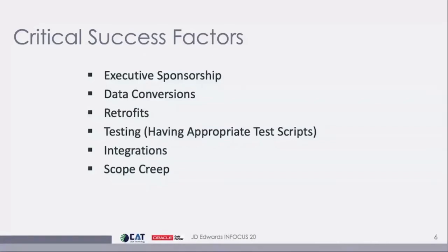And then last but not least is certainly scope creep. I've seen a lot of migration upgrade projects that we start out with a technical only upgrade, and it very quickly migrates into that functional and sometimes even transformational. We've just got to level set with ourselves up front in the planning steps and the assessment steps of an upgrade to make sure that we have the right scope.